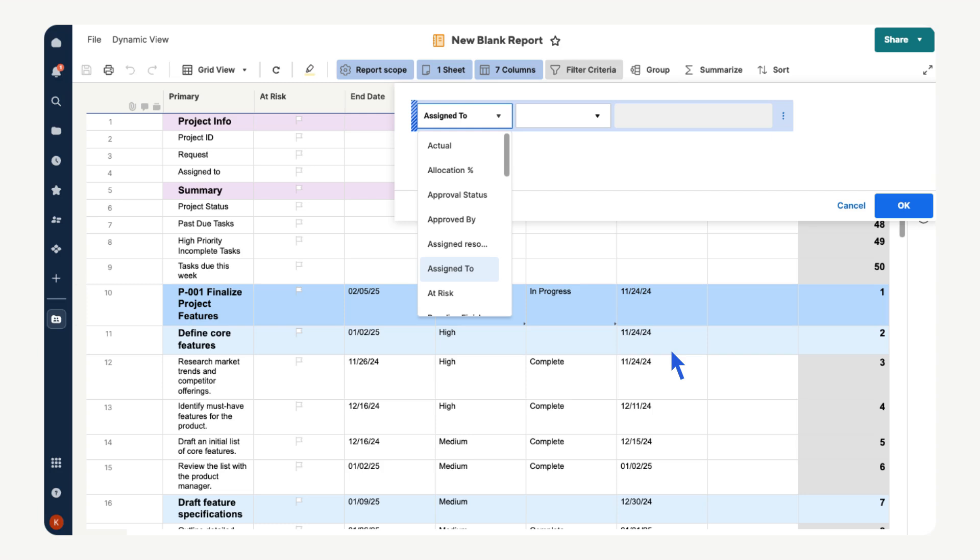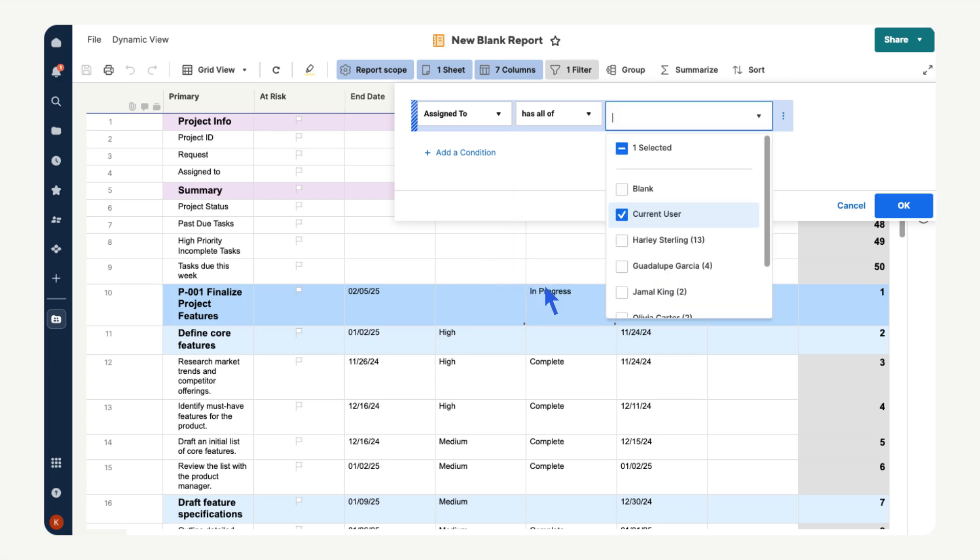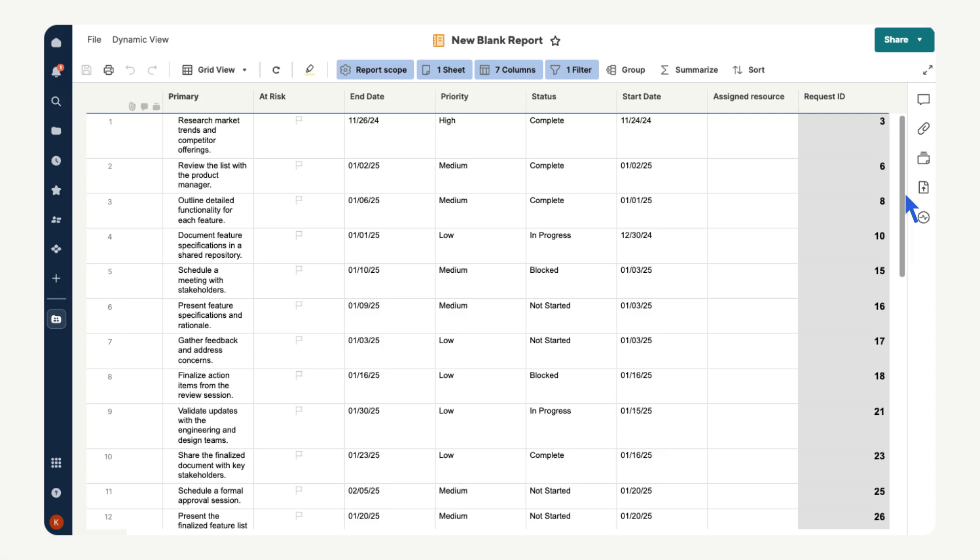You can add multiple filters but for now let's make this report show tasks assigned to the current user. Select assigned to, select has all of, choose current user then select ok. Our report shows the tasks from the first project assigned to whichever user is viewing the report.